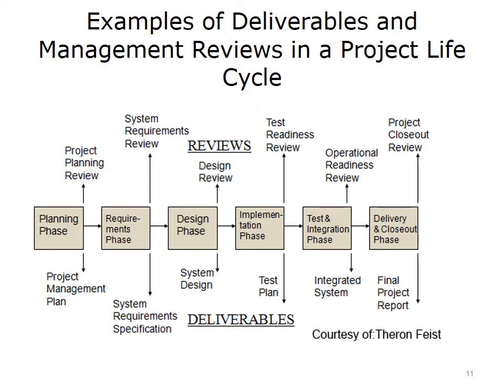Again, some of the deliverables just reflect logical activities being performed during the particular phase, such as the result of the implementation phase, which would certainly involve code for the system as well as a test plan. The test plan would be an important deliverable from the implementation phase that you could review. And this would help ensure that your team is ready for the testing phase that follows.